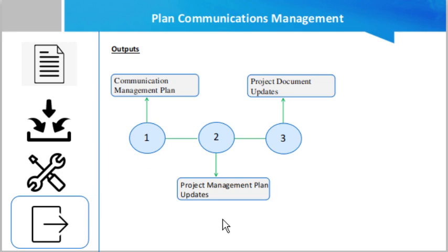Next is the project management plan updates. Any change to the project management plan goes through the organization's change control process via change request. Components that may require a change request for the project management plan will be included here. Project documents updates. Project documents will be updated here.